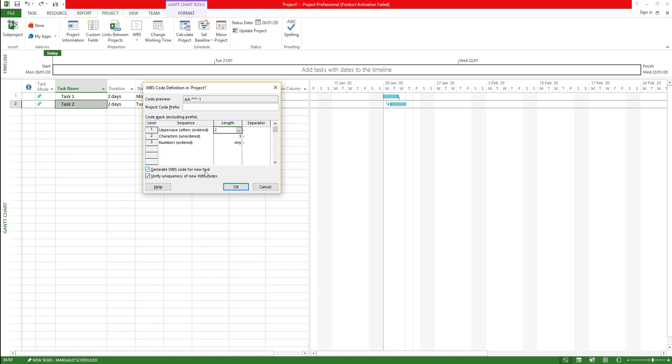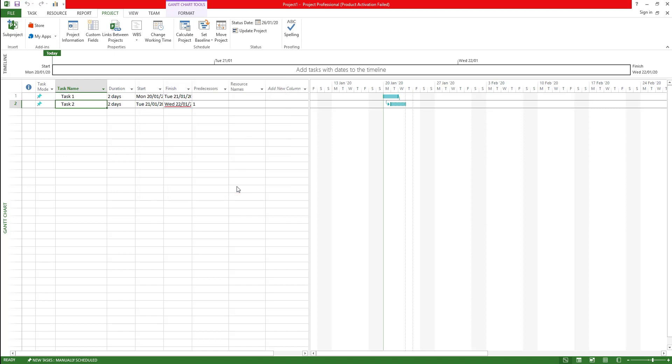This button will generate WBS code for new tasks and verify uniqueness of new WBS codes. That means every code that you enter, every code that is created whenever you create a new task, it will make sure that it is unique so that you're not duplicating those ones. Click OK. We have done that.